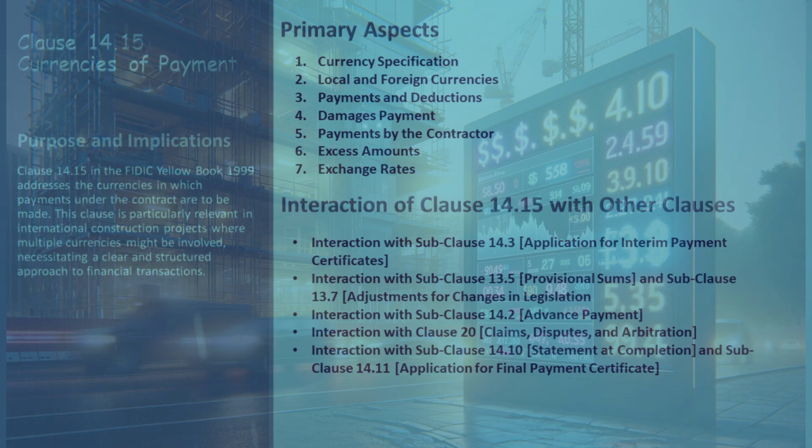Moving on to interaction of Clause 14.15 with other clauses. Clause 14.15 directly links with Subclause 14.3, which addresses interim payment certificates. It specifies that payments and deductions under this subclause should adhere to the currency provisions of Clause 14.15. This ensures consistency in interim financial transactions.